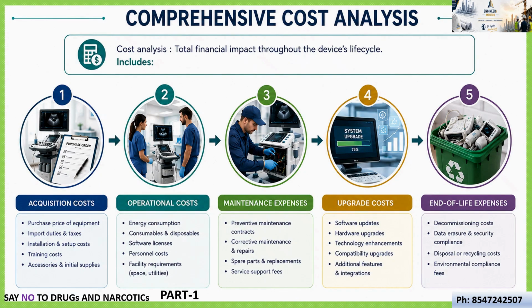Next is a comprehensive cost analysis. Comprehensive cost analysis means total financial impact throughout the device's life cycle, which includes acquisition cost, operational cost, maintenance, upgrade, and end of life cycle cost. Many a time I have seen that the hospital, the investor will calculate the purchase cost and installation and running cost. Sometimes he may take care about the maintenance cost slightly.